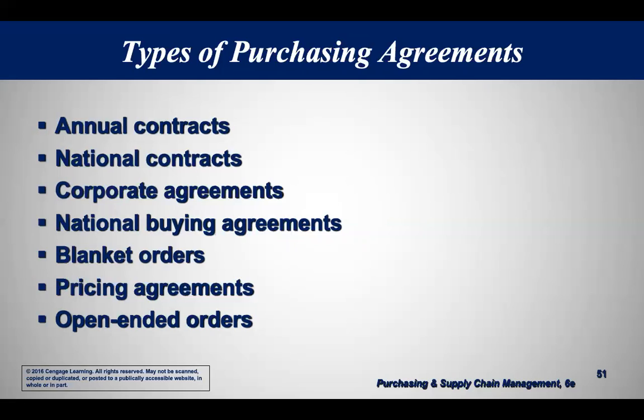you with, I'll pick on desks again. They may say, we don't know how many desks we need over the next year, but we'll agree on a price of $500 right now, and we agree that we'll buy all our desks from you. And when we need them, we'll order them.